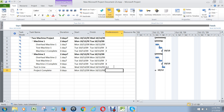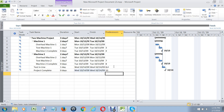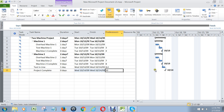Last thing — the project is complete after we've tested in line, so I'm going to put ten there. That's another common mistake: I see the final project milestone just sitting right here at the far left without any task linked up to it.